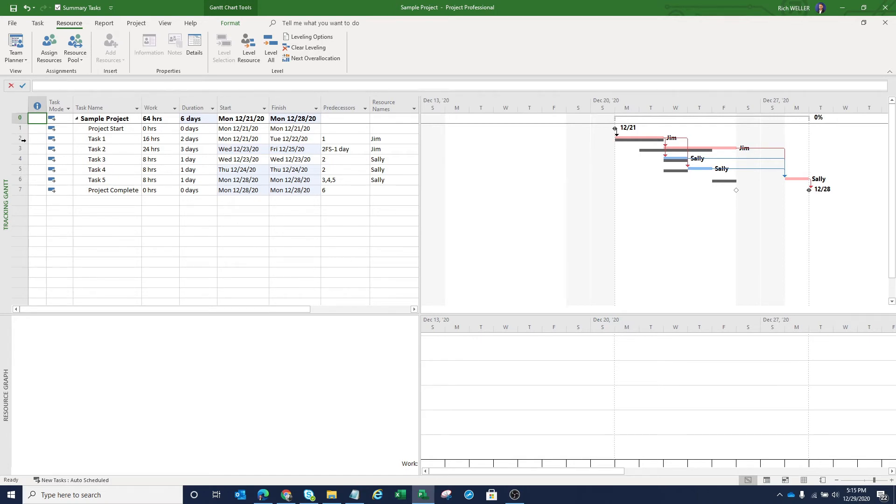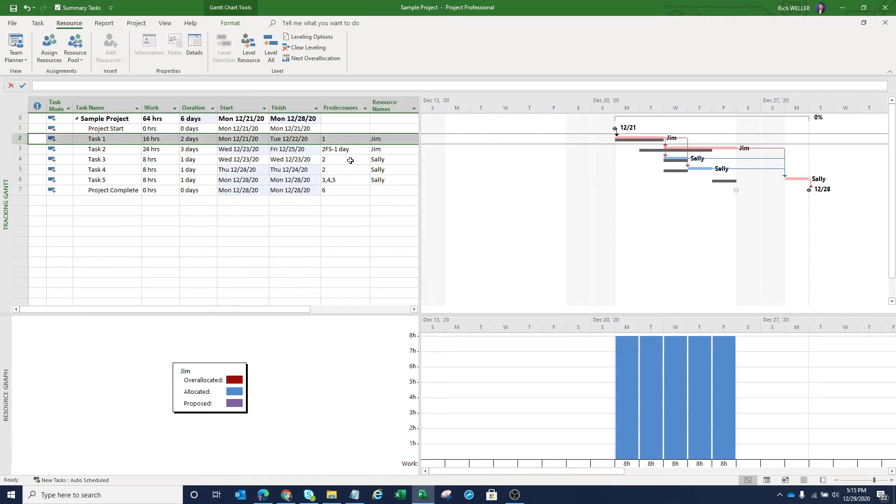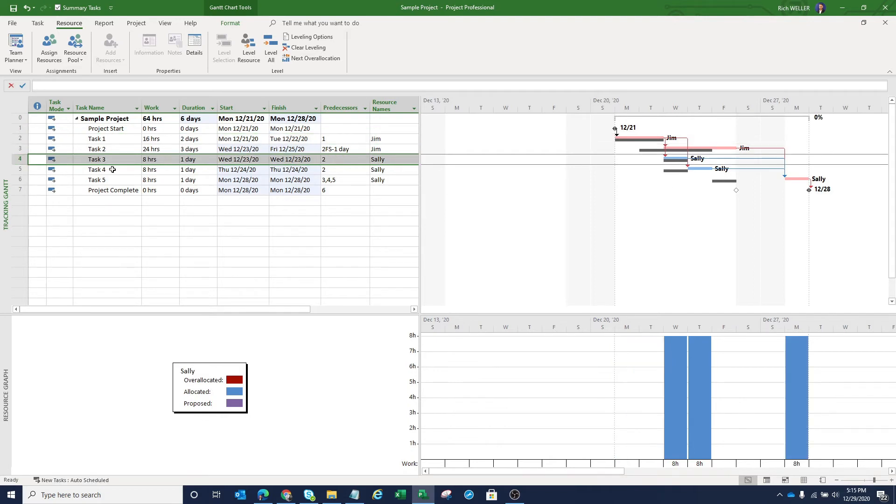And what that means is none of our resources are now over allocated. If I click on task one and we look at Jim, you can see that he is no longer over allocated. Same with this task in which Sally is assigned to. She is no longer over allocated.